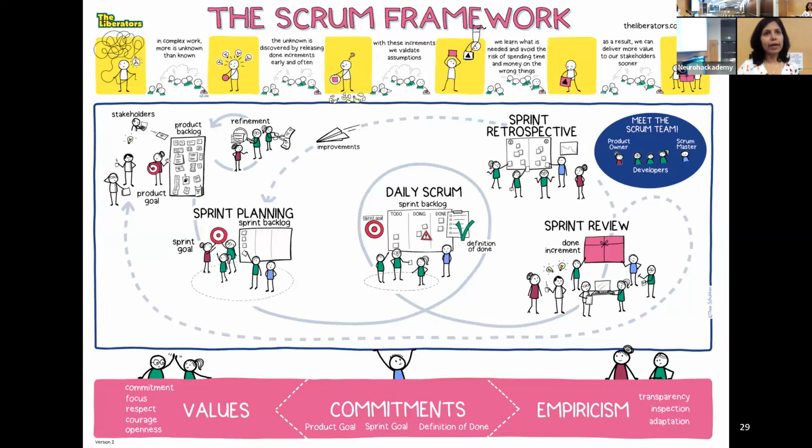And then in the next stand-up, you discuss your findings with your team and brainstorm whether you have enough information now to do the task. You're no longer blocked. Otherwise, that parent task is being blocked by the subtask where you have to do the research to come up with an estimate that is feasible to do in the time frame that you have.